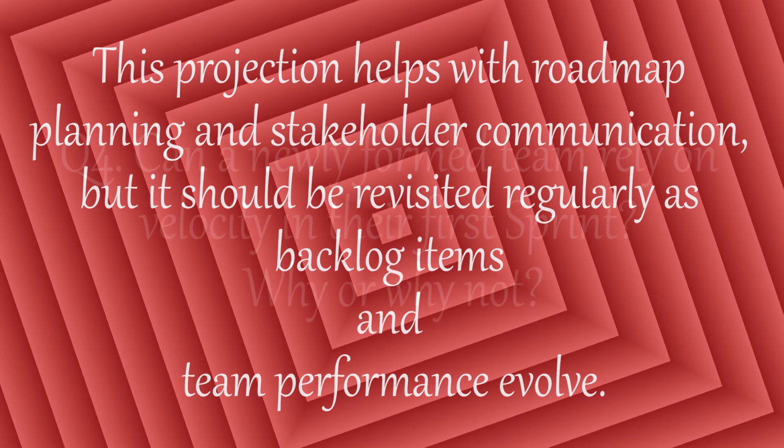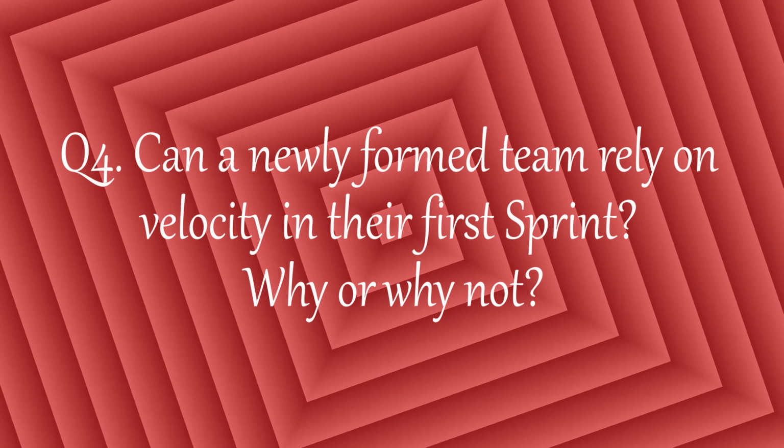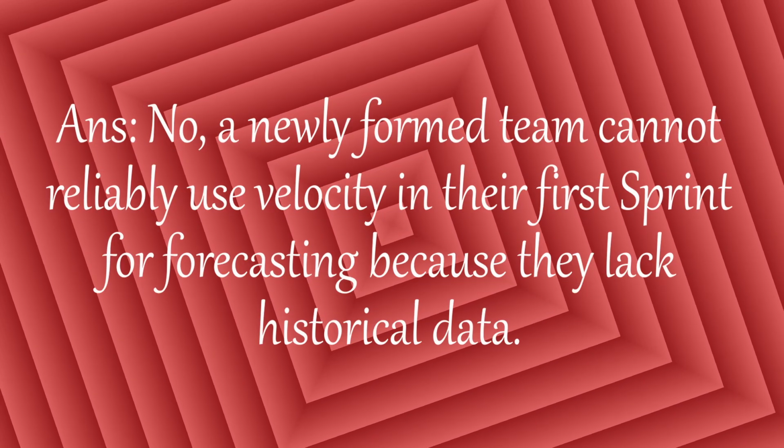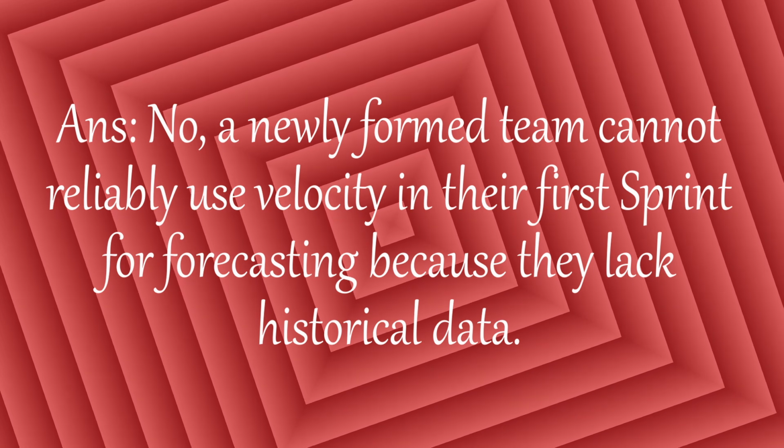performance evolve. Q4. Can a newly formed team rely on velocity in their first sprint? Why or why not? Answer. No. A newly formed team cannot reliably use velocity in their first sprint for forecasting because they lack historical data.